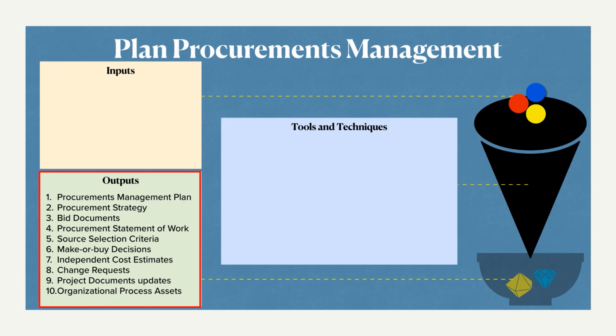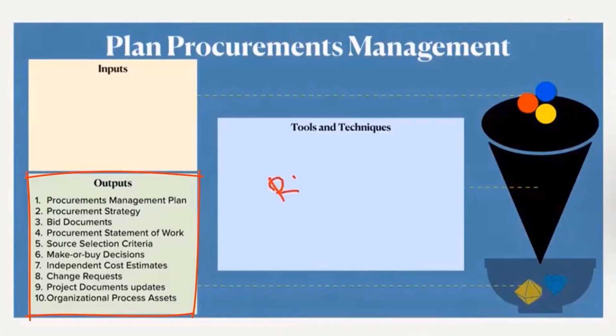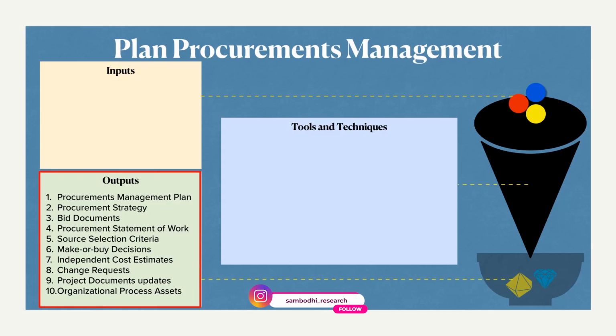And then we have bid documents. I think it is self-explanatory. This is a document proposed as a quotation about the amount the vendors seek to make this product, right? First there will be a request from the user organization, of course, in the form of an RFI or RFQ, which is a request for information or request for quotation. And then finally, the organization buying the product will ask for an RFP, request for proposal, where the vendors will send the final proposal, having all the money, the amount that they seek to make this product, right?